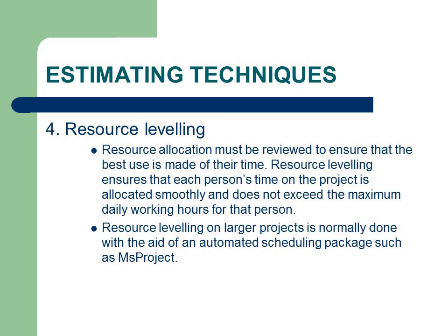The fourth estimating technique is called resource leveling. This is a very important technique. It's used to optimize the use of resources on a project. Resource planning should aim to utilize resources in a consistent manner so they are consistently productive, not busy one week and nothing to do the next.